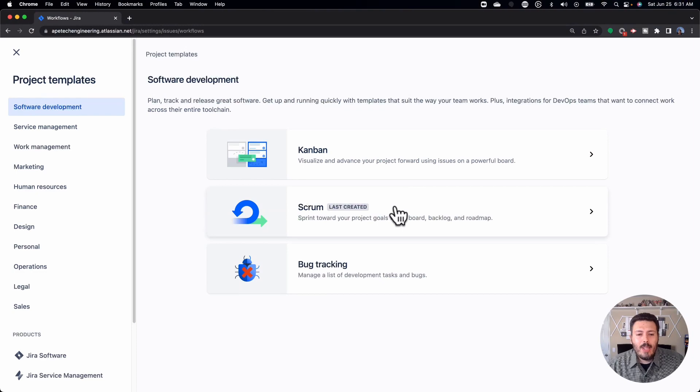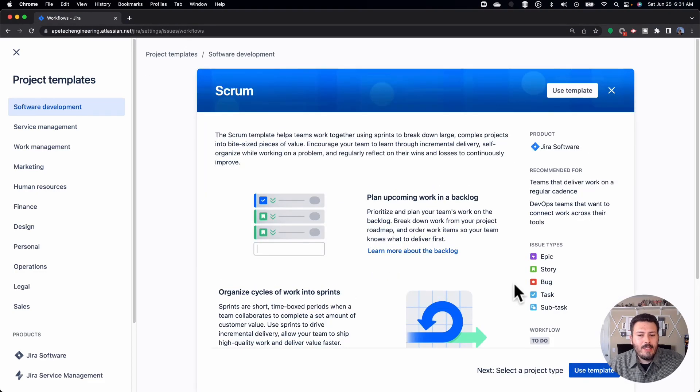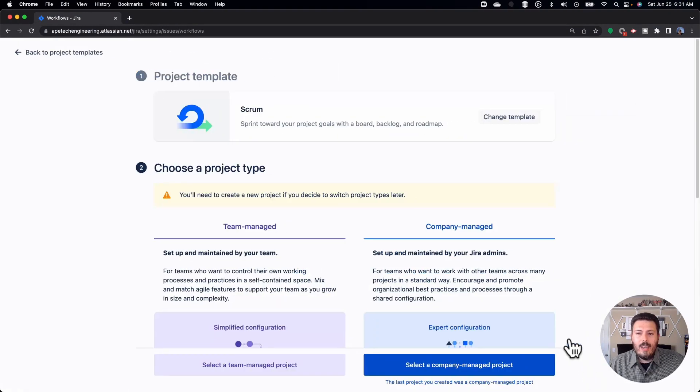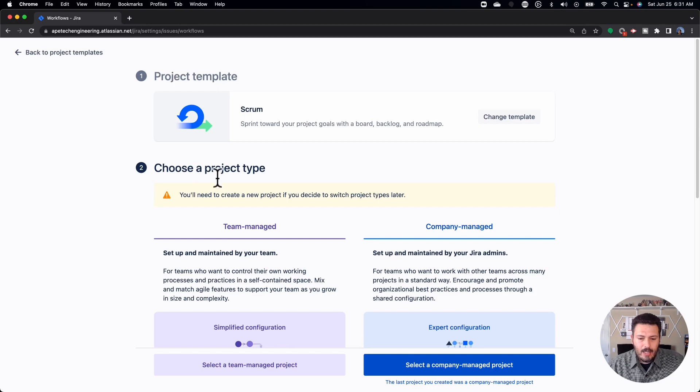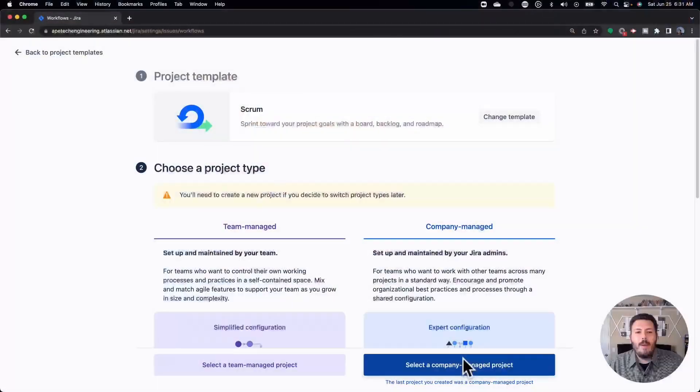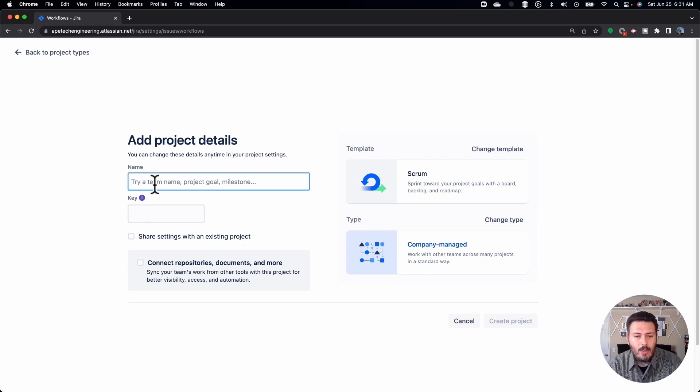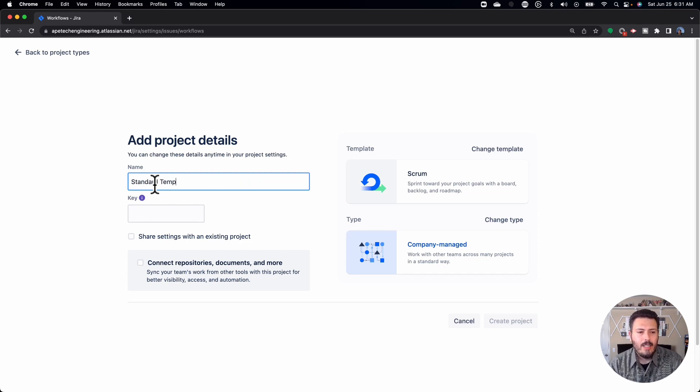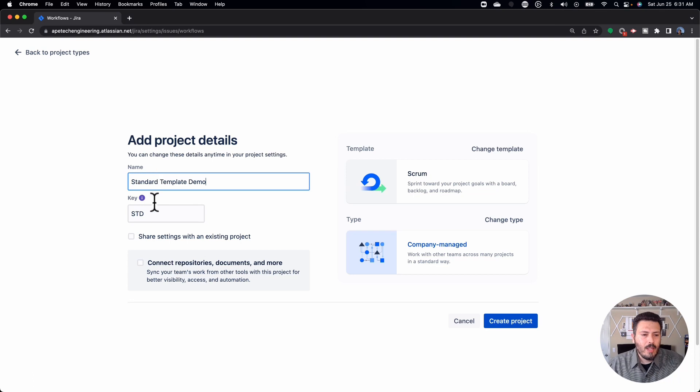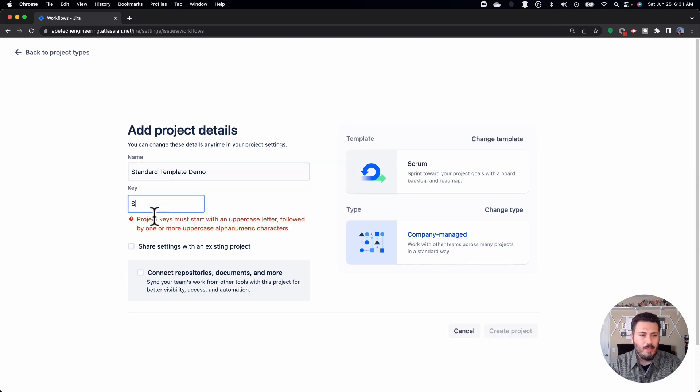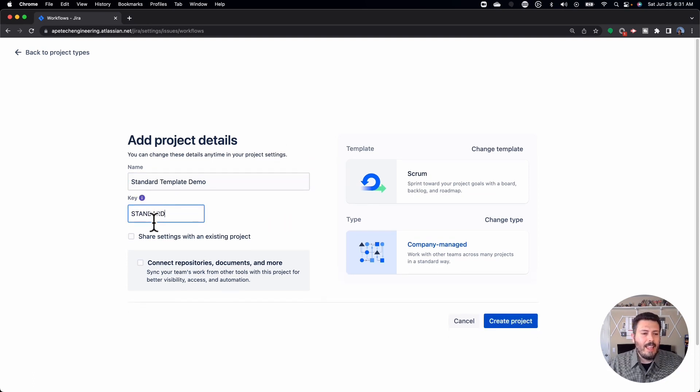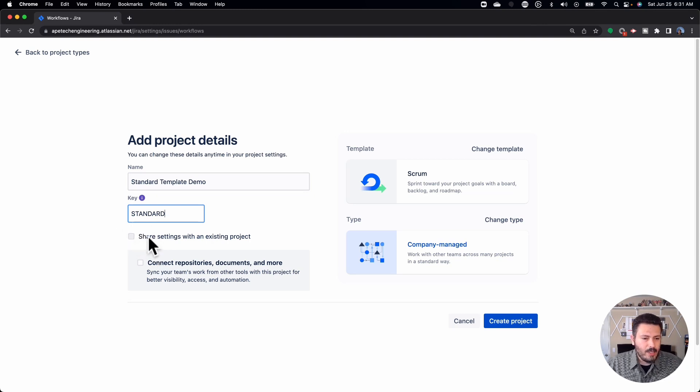Anyways, we're just going to pick Scrum because who doesn't like to do Scrum now? And everything's the same. You should pick that used template. We're going to pick company managed. This will not work. This is not going to work if you do team managed, so make sure you pick a company managed project. And so once you do that, you can give it a name. So we're going to call it just a standard template demo. And I don't want an STD, so I just call it standard. And then this is a little checkbox that I'm talking about. If you look at this checkbox, it says share settings with an existing project.